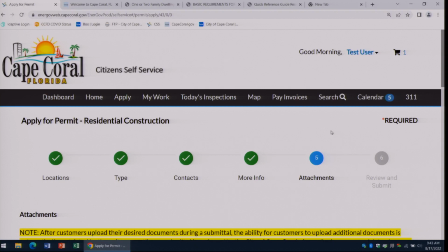And secondly, how long does it take for all those 5 processes of the different steps? Of the plan process? So total time, how long? So there's a Florida state statute that from the time of a complete application, we have 30 business days to either reject or issue your permit. So that means 30 business days for all of those reviews to happen.